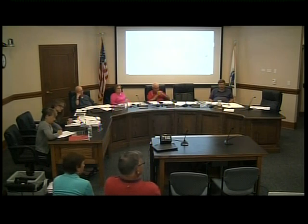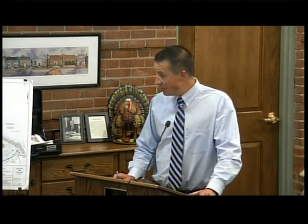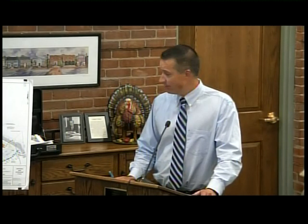Good evening. Greg Hockmuth, Williams Inspiragus, here representing the applicant. I think the main goal for everyone here with respect to the beaver dam is to get that water flowing again and to have it continue to flow at whatever the normal level is for that reach of Mosquito Brook. We were actually hoping that some abutters would show up tonight because in order for us to get this in sooner than later, we really need some type of an imminent threat to public health. A high water table as a result of a beaver dam with respect to septic systems is generally what you need to get permission for an emergency certification. And I think that's exactly the case here.